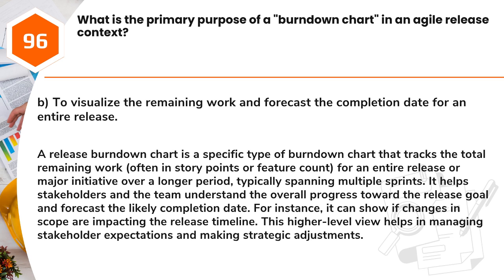It helps stakeholders and the team understand the overall progress toward the release goal and forecast the likely completion date. For instance, it can show if changes in scope are impacting the release timeline. This higher-level view helps in managing stakeholder expectations and making strategic adjustments.